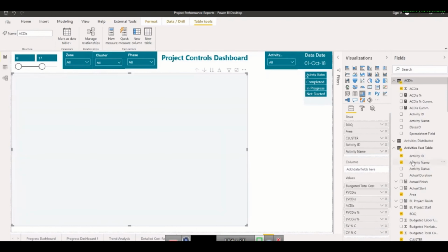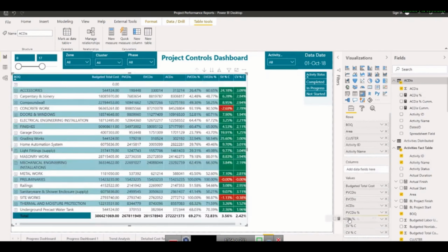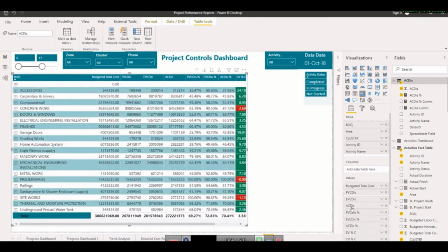it's important to compare all these values once we have them, and it's not necessary that we bring actual cost from P6. Definitely, if you are bringing it from P6, that means you are putting actual cost, actual quantity and man hours inside P6, and how you do it is your practice, and you know better how you are doing it. But if you do not do this, you can bring all these actual values from ERP or an Excel sheet. If you are recording your actual hours in an Excel sheet, you need to bring that.